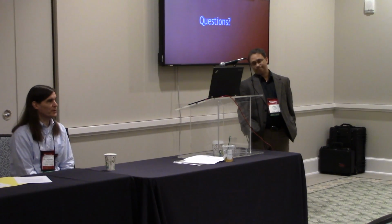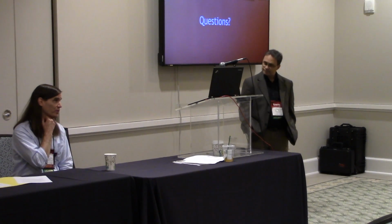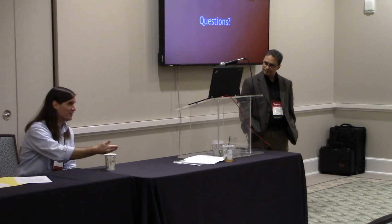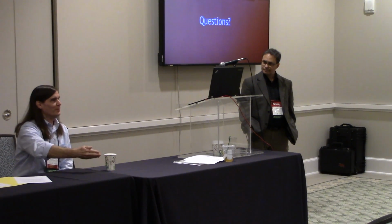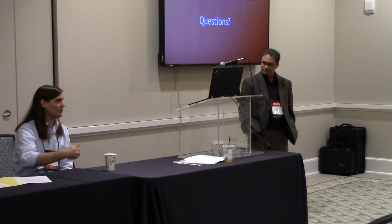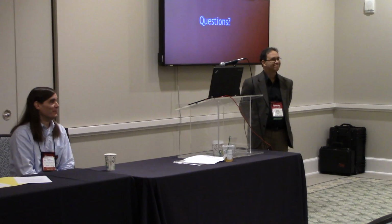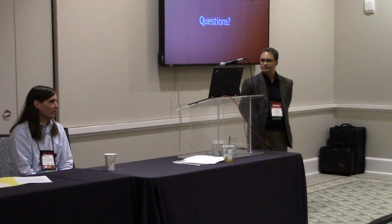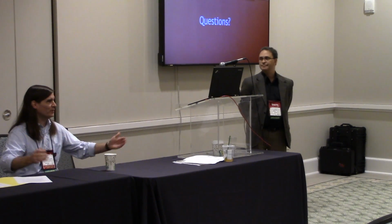We contracted all of that out, and then when we went through and did the punch list and all that stuff, that was handled a little bit through our facilities too, because we didn't know exactly, like, hey, this shouldn't look like this. It didn't look right, but they came around and said, yeah, this isn't right. So we had guys coming around going, oh, okay, I'm glad. So it was nice having them involved as well. Well, they always like to be involved. Oh yeah, they do, but they did a really good job, and we were really thankful, because some of the things we thought shouldn't be like this, they said, put it on the punch list. They said put everything on the punch list, anything you don't like. And they actually went around and said, that's not right, that's not right. And that was good, those things that we didn't see.